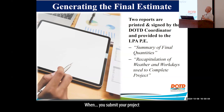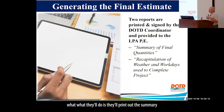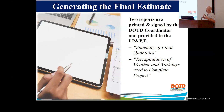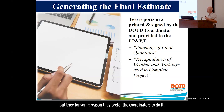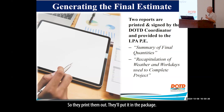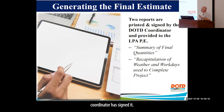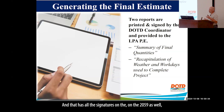When you submit your project to the DOTD coordinator, they'll print out the summary of final quantities and the recap of weather and workdays. For some reason the coordinators prefer to do that printing themselves. They print them out and put them in the package. Always make sure the DOTD coordinator has signed it and that there are all the signatures on the 2059 as well.